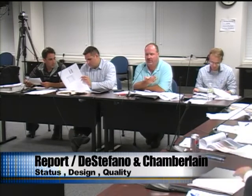This change order also, though, includes tighter spacing of the framing posts. Yeah, the posts. So there's a lot more posts. There's 60-something more posts in this change order request. Kevin, this is getting in the weeds, but why do you need more posts if you're surface mounting all these? That was another recommendation from the cable vendor. They have a maximum distance that they like to span. Now these, they do sell these. I don't know that Nature Rail has them, but some of the other types of cable systems sell a vertical metal post that's a very slim thing that you pass the cables through. We thought about that, but felt a little bit more comfortable with the wood post because it would give you more stability to the top rail of the guard system.